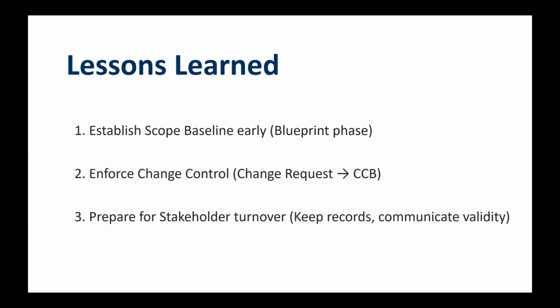Third, prepare for stakeholder turnover. As project members inevitably change, official documentation of the baseline and change history is critical. Consistently communicate that prior agreements remain valid. In short, baseline and change control act as mechanisms to reduce project risk.